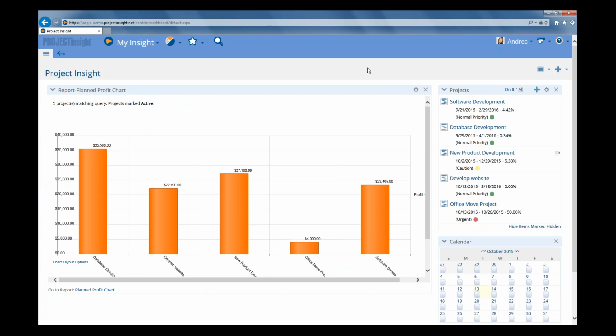Okay, so a fixed price is when you agree with your customer what is going to be the predetermined amount that you're going to bill them for the work you are doing. Now, this may be a total fixed price for the entire project, or more commonly, it may be a fixed price for each milestone or deliverable. And this is very different from a time and materials project, where you bill for the work as it occurs.